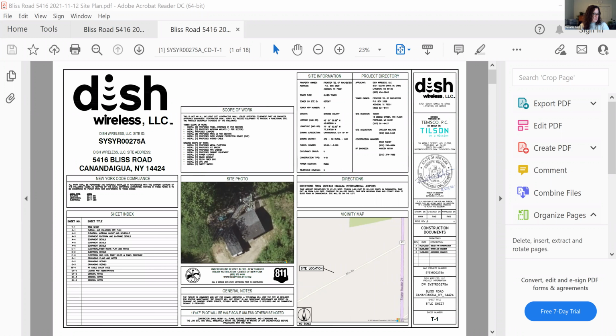So, let's see. Also, the special use permit application is not signed by the owner. That was another one of the pieces that we forwarded you on Friday. So Everest has a leasehold on the property. Frontier's authorized them to do all the leasing for the tower, and we have the application signed by them. So we need the owner to sign the application, because if you don't pay the bills and stuff like that, it goes back on the property, not the leaseholder. So the applicant, the owner has to sign. That's no ifs, ands, or buts.